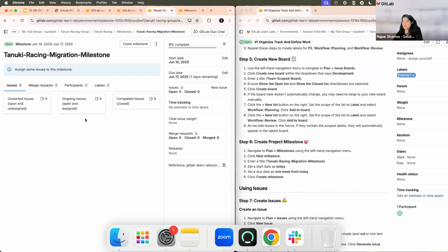So again, it's a place where you can see issues, merge requests, all associated. You can also interestingly use labels to identify the work. For example, you have a feature coming on and you want that as part of labels. You put that name as part of labels and attach all the user stories. You can see for that particular feature what kind of labels are being used. For that particular milestone, what labels are being used. So you can use it in different ways.